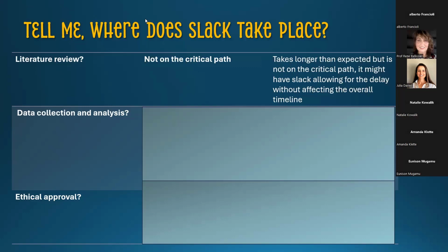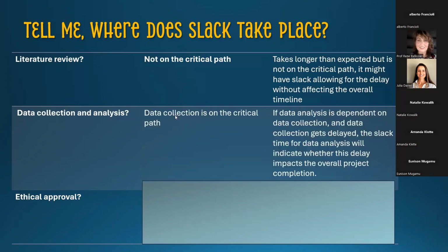Anyone? Well said. Data collection becomes a problem. You cannot conduct the analyses of the data if you've not undertaken the data collection. So if there's a problem with the data collection, there's no slack in that getting to the data analyses.